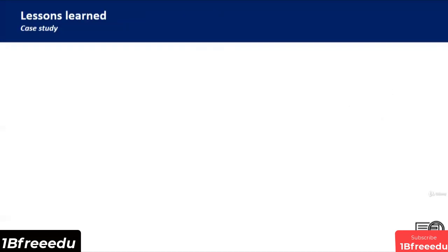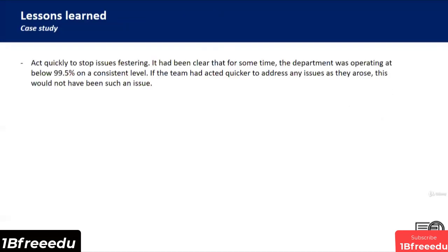So what were the lessons learned for this particular project? Firstly, act quickly to stop issues festering. It had become clear for some time that the department was operating at below 99.5% on a consistent level. Now, if the team had acted quicker to address any issues as they arose, this would not have been such an issue. The data was showing that for over 3 years, we were in and out of 99.5%, right? We were not hitting it consistently for a period of time over that 3-year period. We should address this quicker, and we wouldn't have had to have such a big project to fix this.